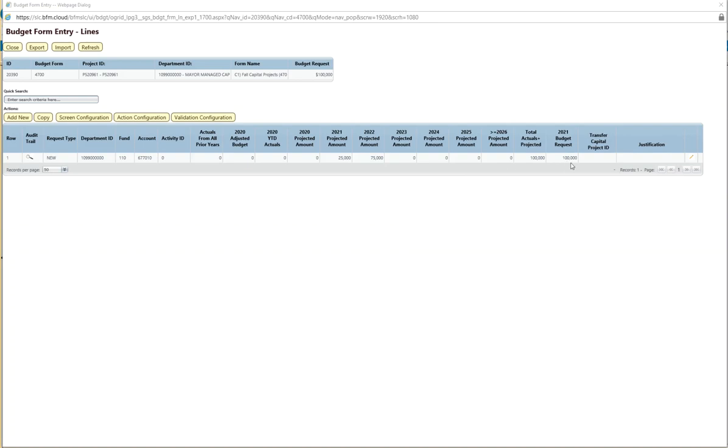In most cases, the budget request should equal the total of the projection for that year and all succeeding years. There may be some infrequent cases where large multiple year projects can't be fully budgeted in a given year without causing the fund balance to go negative or below required reserves. Cases where the project relies on multiple future years of revenues to fund the project.